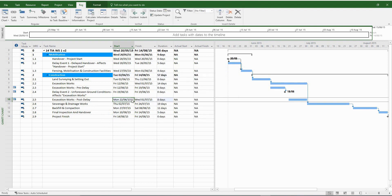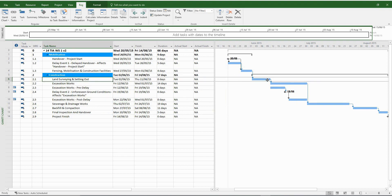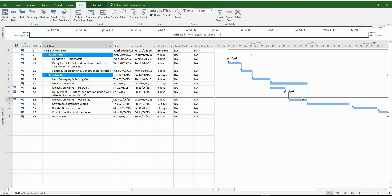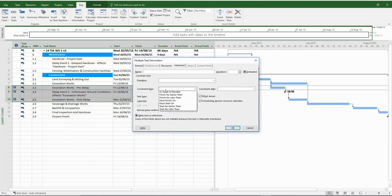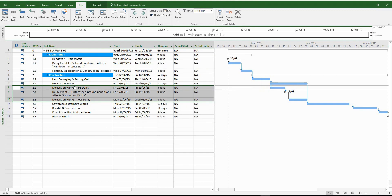When you get the Planning Wizard pop-up menu, please make sure to click on the second option. Now it's time to connect our Fragnet to the main network. Let's put a finish-to-start relationship from Land Surveying to ExcavationWorks pre-delay, and another finish-to-start relationship from ExcavationWorks post-delay to Surveying and DrainageWorks. After this, we can remove the constraints implemented by MS Project — change all constraint types to the 'as soon as possible' default option. The finish date hasn't changed, so now we're in a position to delete the original excavation activity.